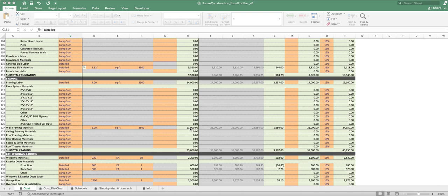The framing labor is similar, same square foot. You can see the quantity is the same. The price is a little bit different, it just has $14,000 there. You can see those add up to make $35,000.